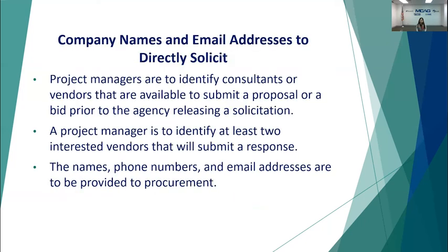Company names and email addresses to directly solicit. Project managers are to identify consultants or vendors that are available to submit a proposal or a bid prior to us releasing a solicitation. The project manager is to identify at least 2 interested vendors that will submit a response, and you will provide the names, phone numbers, and email addresses on the procurement request form.